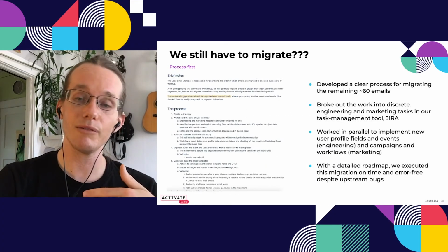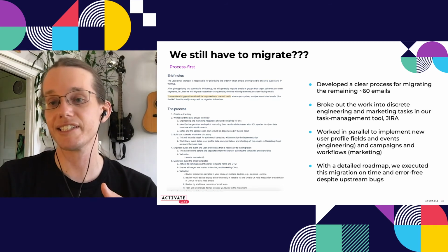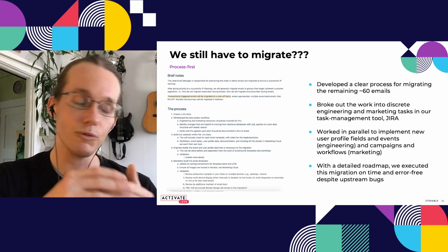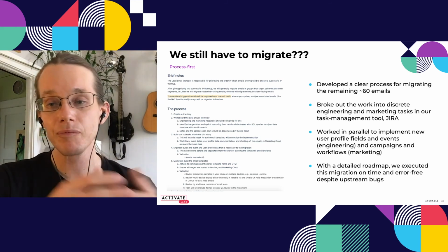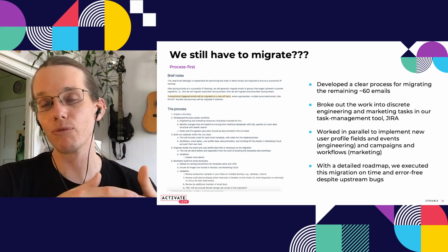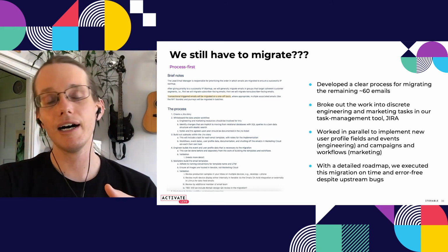So I wrote several more briefs, including a very detailed brief on how we were going to migrate each of the remaining 65 emails. We broke all that work out again into discrete tasks and epics in Jira. And by breaking out all that work, we allowed our engineering and marketing resources to work in parallel, which